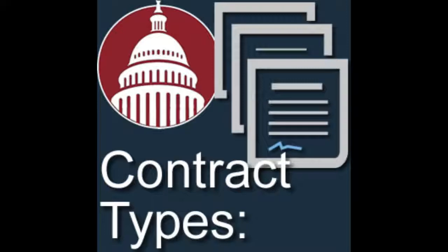As opposed to cost type, where a lot of that risk shifts over to the government because a certain amount of cost is covered regardless of how well, that sounds bad. But realistically, regardless of how much of the contract you actually accomplish, you're going to get a certain amount of cost covered. Right. So the risk shifts over to the government. That's really the fundamental difference. Yeah, and it's a little bit different.